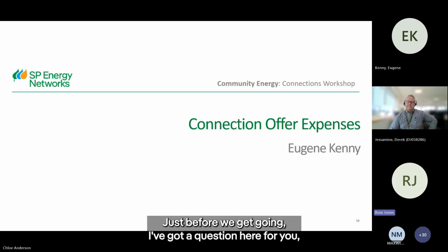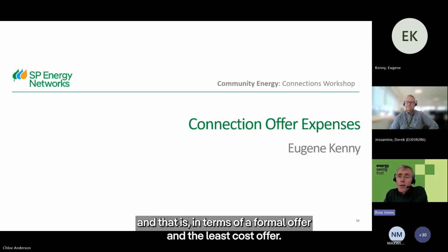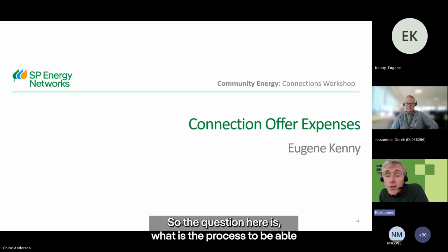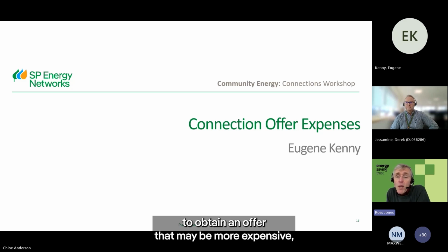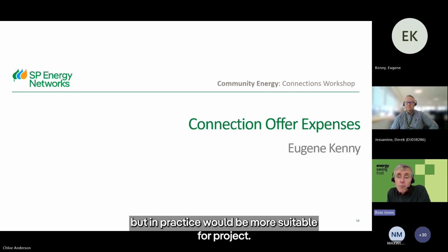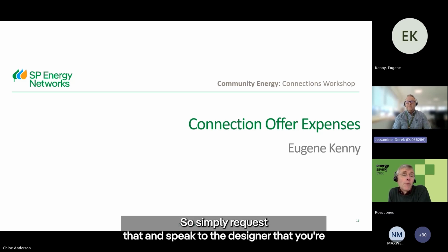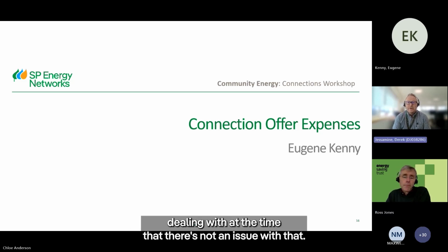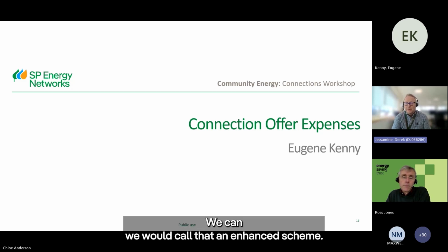Just before we get going, I've got a question here for you, in terms of a formal offer and the least cost offer. What is the process to obtain an offer that may be more expensive, but in practice would be more suitable for a project? Simply request that and speak to the designer that you're dealing with at the time. There's not an issue with that. We would call that an enhanced scheme.